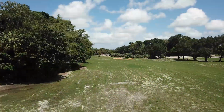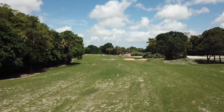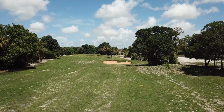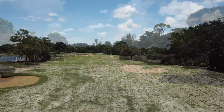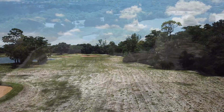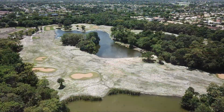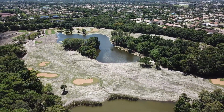Hole number 8 was planted 4 weeks ago, and the Latitude 36 Bermuda grass is now beginning to spread quickly between the sprig rows. Latitude 36 sprigs on holes number 15, 16, and 17 are now 2.5 weeks old and have greened up very nicely and are beginning to develop new plants, roots, and shoots.